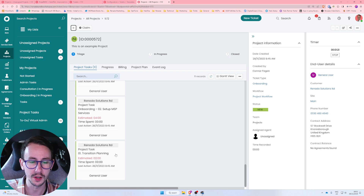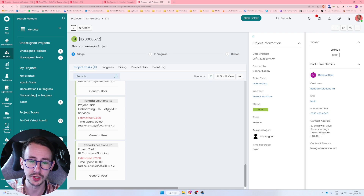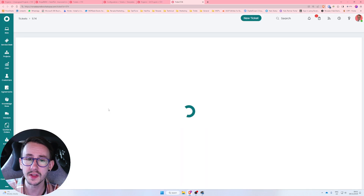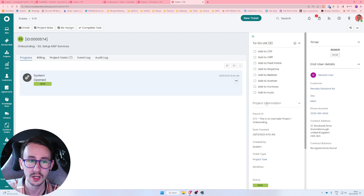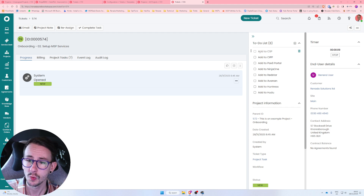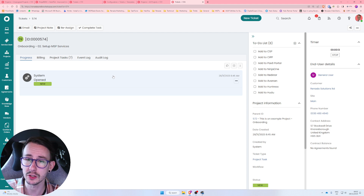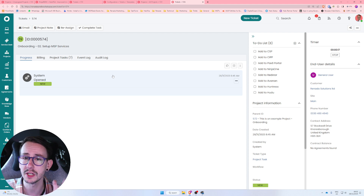With onboarding, our first ticket is transition planning, and the second is setting up services. Within that ticket we've made a to-do list: set up CSP, SIP, Pax8, Ninja, Red Store — and we attach a knowledge base article to that ticket with how to set up all of these things, probably just hyperlinks to IT Glue, Bookstack, or whatever documentation platform you use.